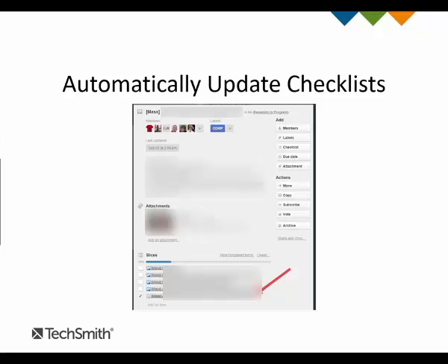Don't bother checking it off yourself before it is actually published, because it will uncheck it. So don't make more work for yourself. But when all of the slices are checked off, the request card then moves to published on its own on the overarching clipboard.